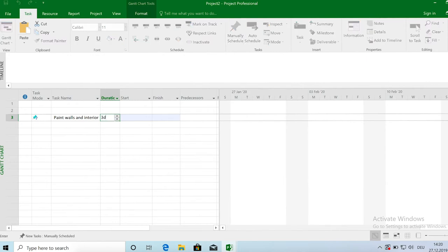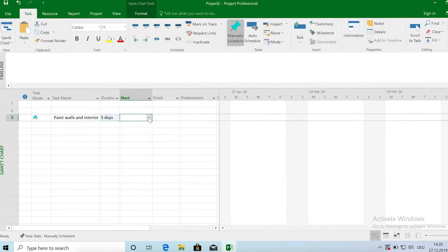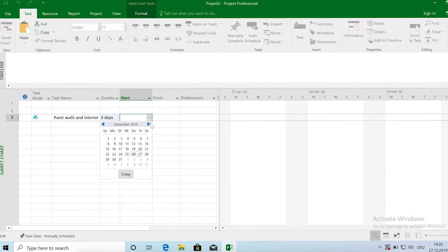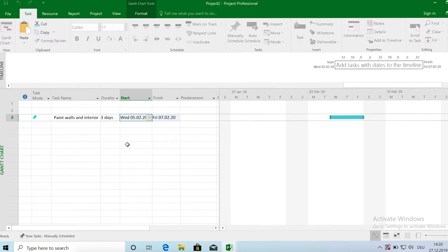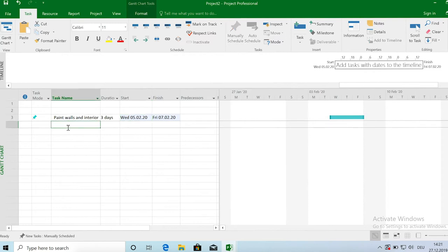So 3 days and we will start let's say on the 5th of February and then once the painting of the walls has been done then we have to wait for two days for the paint to dry before we can put up the furniture.